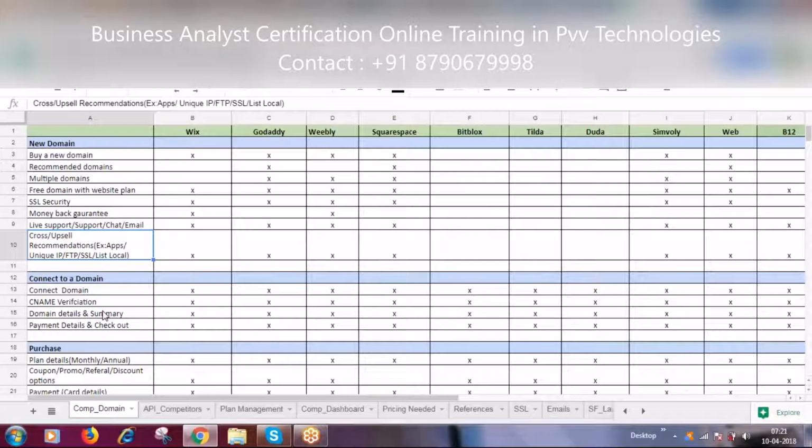But that is the traditional approach that was happening all these days. When it comes to agile, we have shorter sprints, for example ranging from a week or 2 weeks up to 4 weeks. At the end of each sprint, an MVP is delivered, which is a testable and usable product delivered to the client, so that at the end of every sprint, the client comes to know this is what is being built right from the scratch.